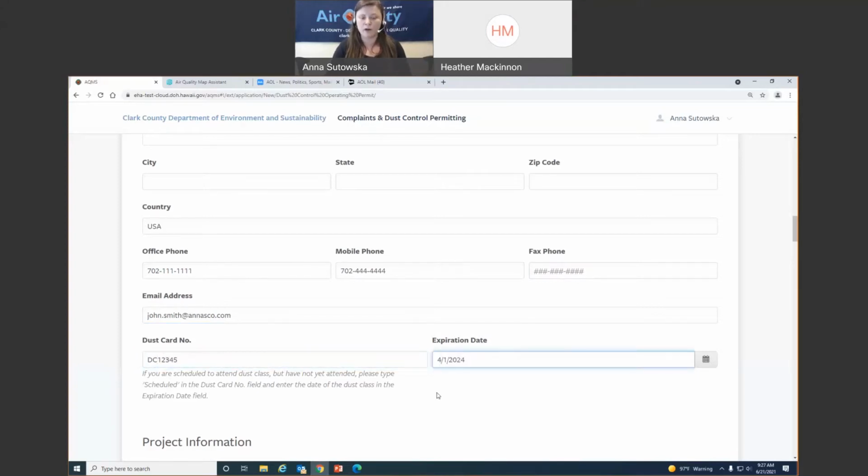Sorry about that. Okay, if you have an on-site that has not yet taken the class, you must sign him up before you submit this permit application. The person must be scheduled for a class before we can release your permit, okay? After that point, they have 30 days to actually attend the class. So we want you to plan accordingly like that. If your superintendent does not yet have a dust card, make sure that you schedule them up for class.